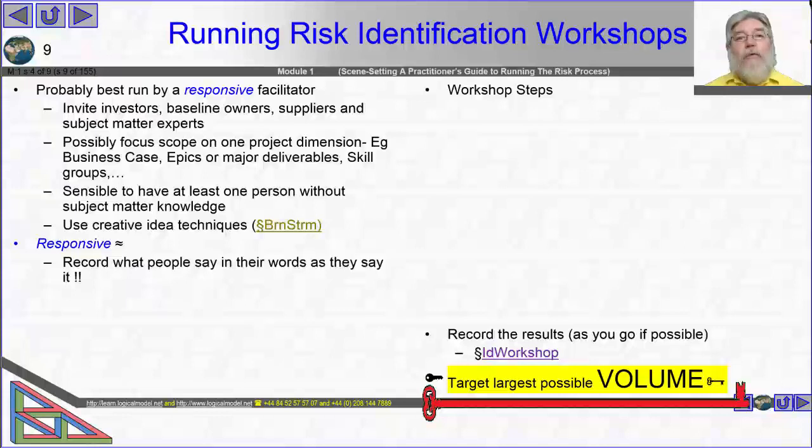And when we get to the end, we will assimilate, we will correlate, we will link everything together. And if at that point it deserves to be crossed out, we'll do that neatly by just transferring it into the register with a note that says this isn't going any further. So item number 1 of being a responsive facilitator is to record what people say or to provide the mechanism by which they can record as we go. Also, being the facilitator means that you need to explain the session's structure, and then you need to follow that structure, but not dogmatically.